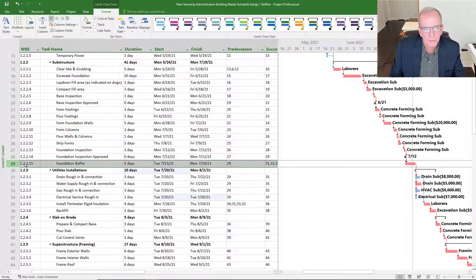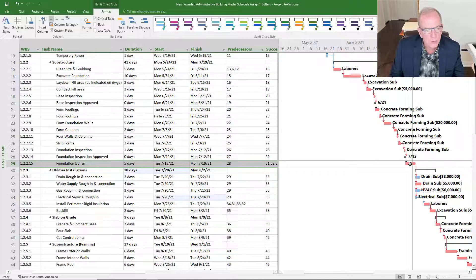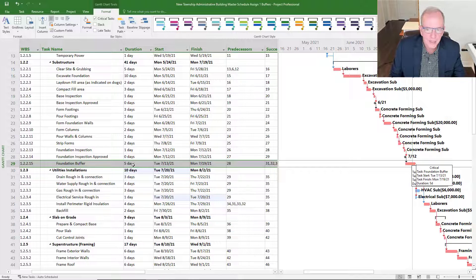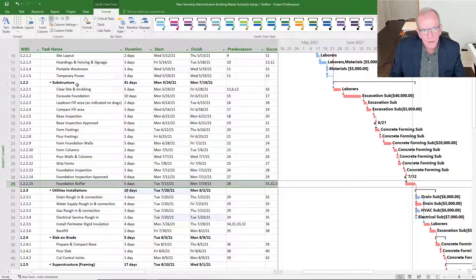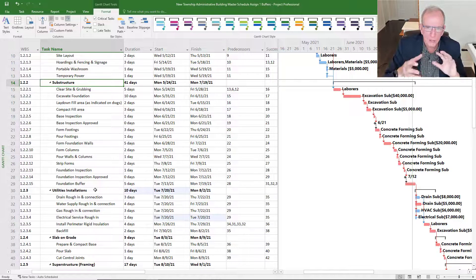Now if you're tracking your project, the advantage is: when you update the schedule it will push out the project if you are delayed on those activities. You can look at the buffer and say it pushed out four days or three days — I still have some time period I could reduce the buffer to get time back. In PMI terminology this would be like putting in a contingency risk buffer. This is more for known unknowns — we kind of know this could happen and we want flexibility.